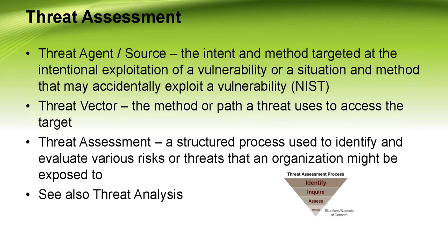Probability is the likelihood that an event will occur. In assessing risk, it is important to estimate the probability or likelihood that a threat will occur. Assessing the likelihood of occurrence of some types of threat is easier than others. For example, you can use frequency data to estimate the probability of a natural disaster. You might also be able to use MTTF and MTBF to estimate the probability of component problems.